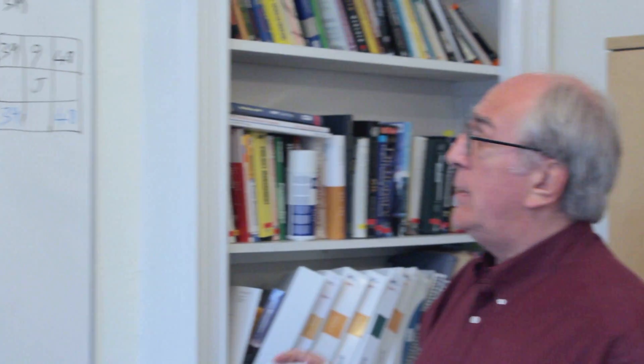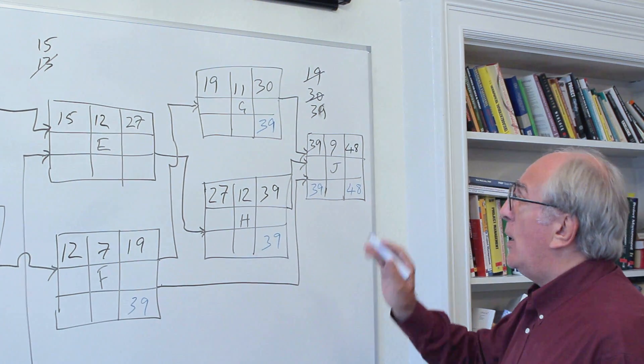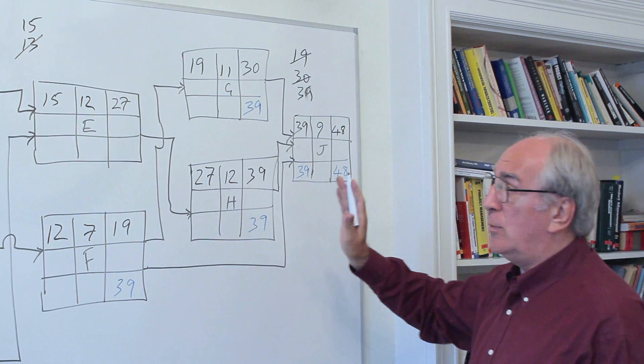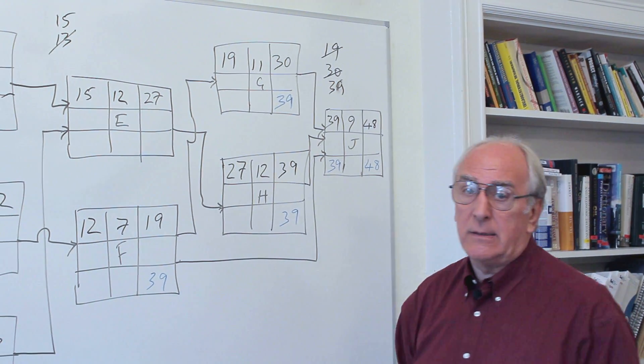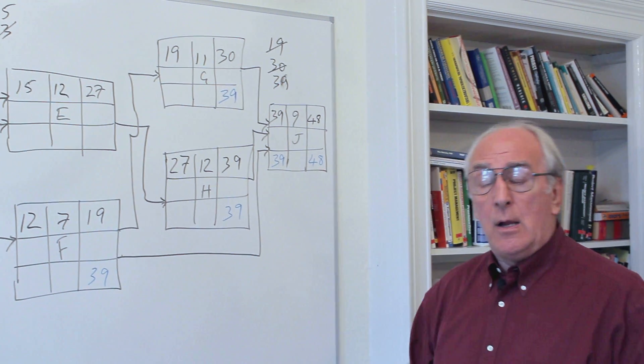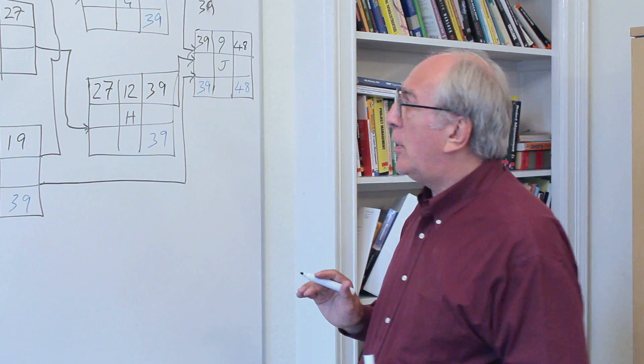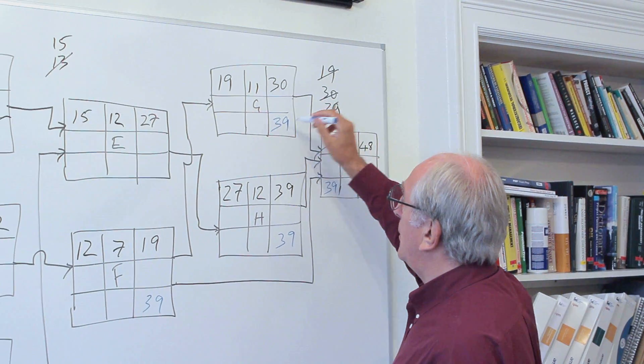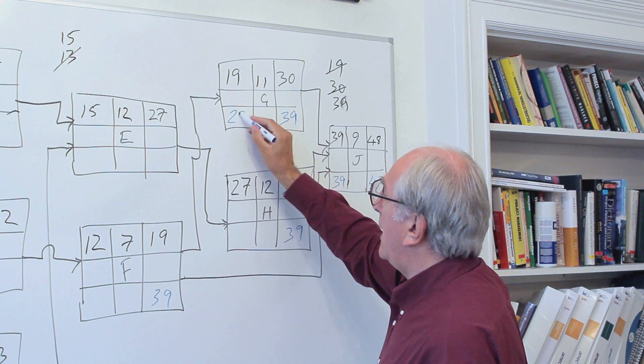We'll look at activity G and say, well, what's the latest time we can start G without affecting the end date of the project? And that's a key assumption. We're now looking at the latest start and latest finishes of these activities to do that without affecting the end time of the project. That's where we're at. So we can subtract the duration from 39, which is 39 minus 11, giving us 28.